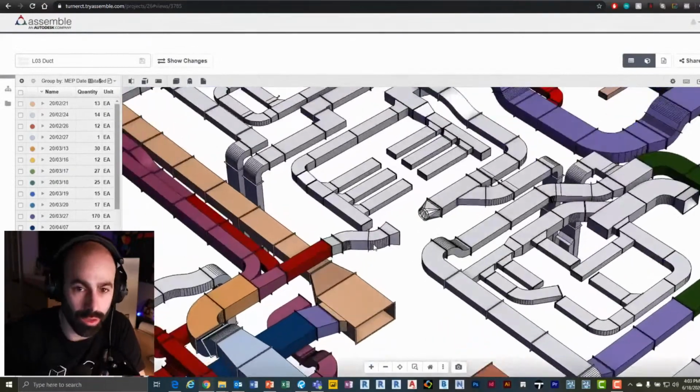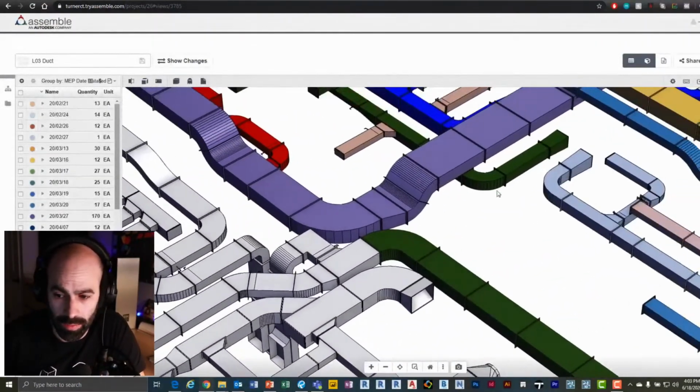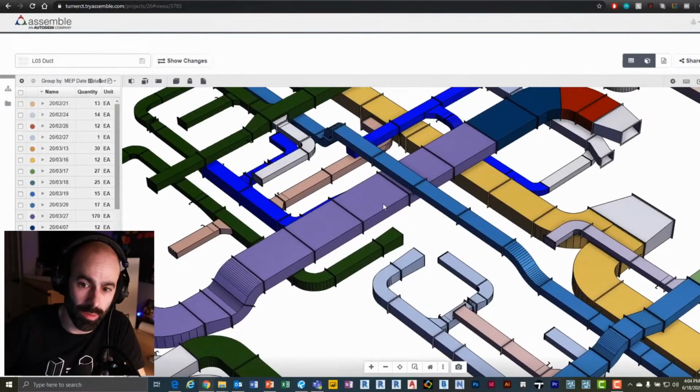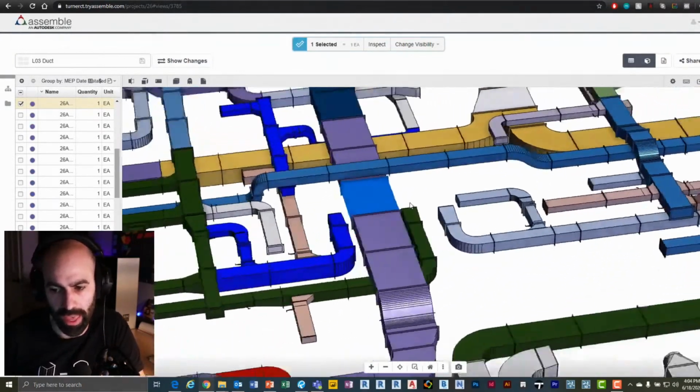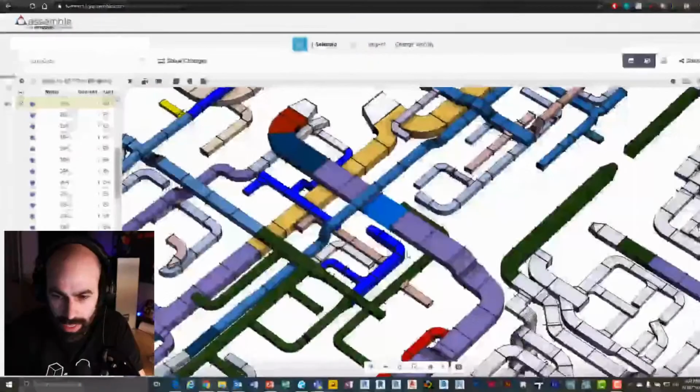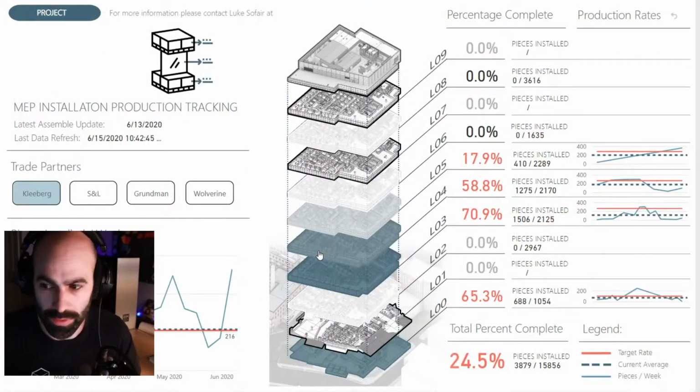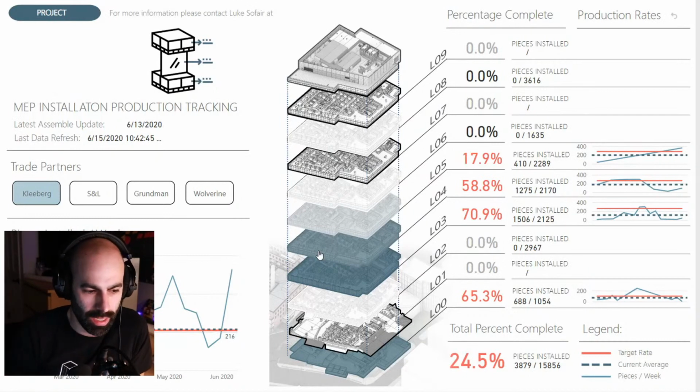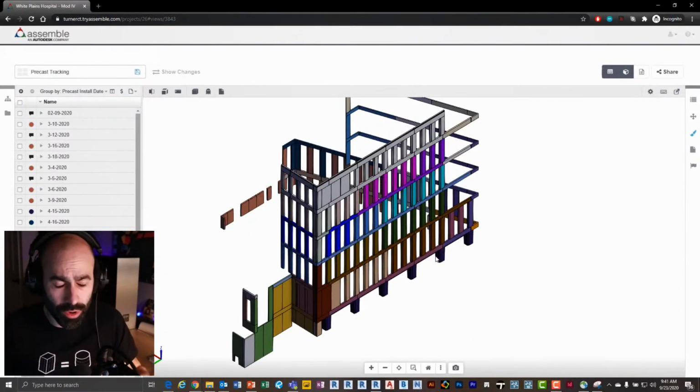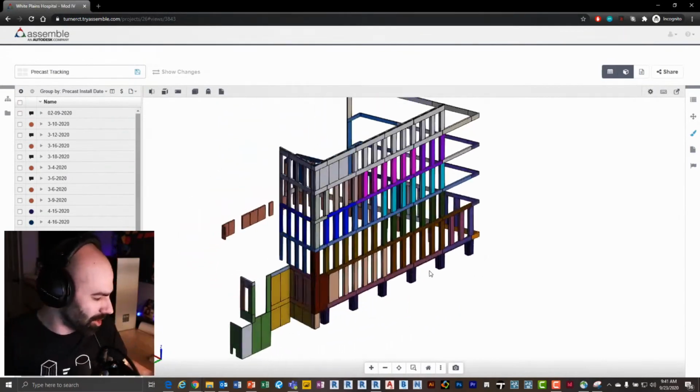As I mentioned, Navisworks, you can bring up files. And so we're actually using our coordinated models from our subcontractors and our contractors. And we're using those to track in-place MEP and dashboards for that. So you can see percentage complete by floor for Power BI. And the really cool thing is this is a dynamic connection, right? So what I mean by that is, because there's a link, if the data is updated on the model, all we do is click refresh or have an automatic refresh on Power BI, and it's always the most up-to-date information, right?